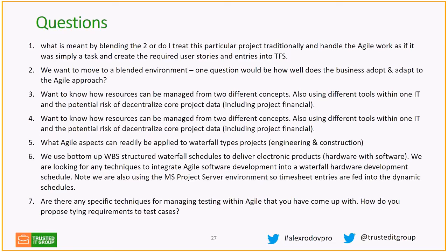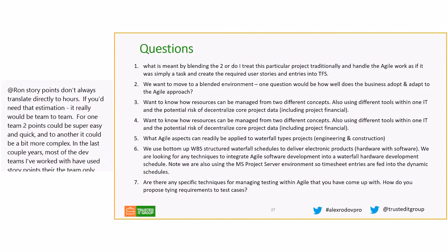and have those aligned with your requirements, and have the requirements metadata tied to those test cases. In this case, you would be able to pull the list of requirements and understand how many bugs and features are still in progress, still new, or completed for your requirements. Some of the Agile tools do it very, very well, and you should look at some of the larger Agile players that can provide you with greater detail on that.